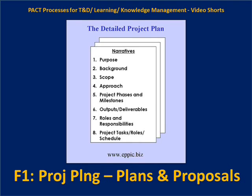Third, the scope sets the limitations of the project — it says what's in the box, what's perhaps borderline on the edges of the box, and what is excluded from the project. This is necessary in order to manage expectations for all the people that might be involved. You simply don't want to find out six months in — or six weeks in — that you're missing the mark and that you should have included somebody you were thinking was to be excluded.